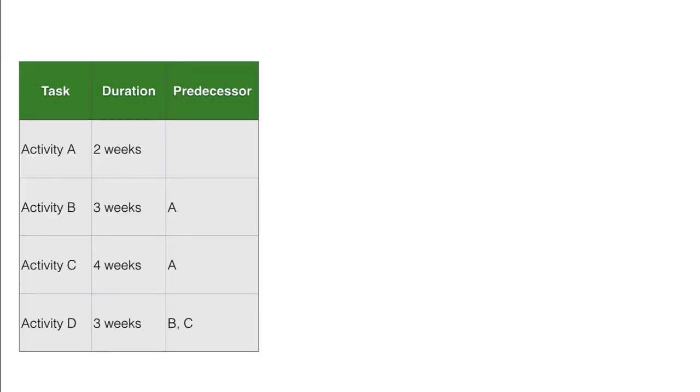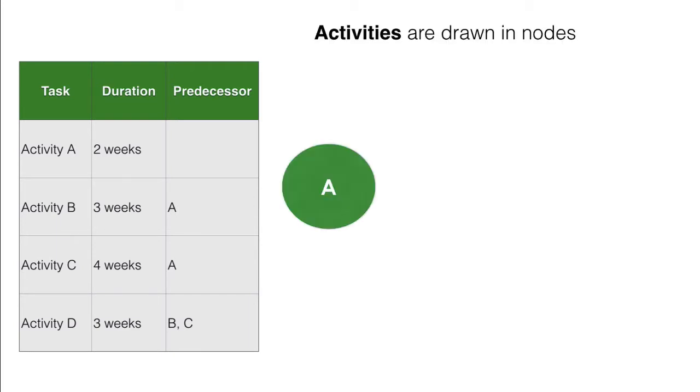Our projects are made up of interrelated activities that are associated to each other with precedence relationships. Each activity or task might have activities that are completed before it can start and activities that must follow. These precedence relationships are most commonly shown in a network of arrows and nodes. The activity name can be shown in a node. Let's take a look at an example.